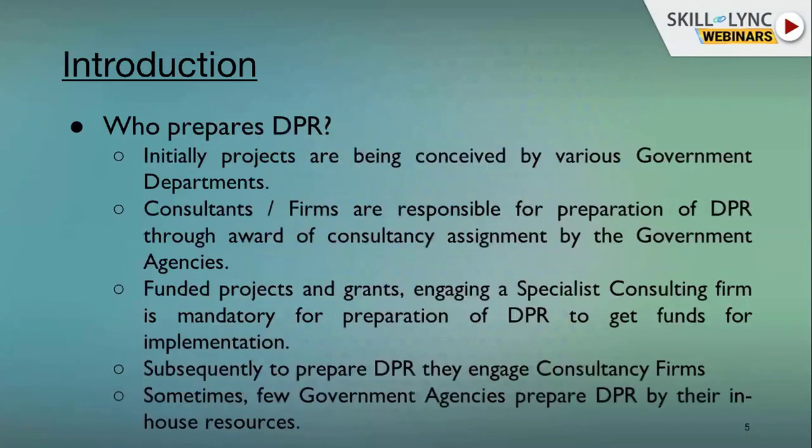So who goes for the DPR preparation? Initially, the project is considered by government departments. Then consultant firms are responsible for preparation of DPR by bidding, and this is awarded by the government agencies. There are funded projects by World Bank, ADB, JBIC, Japan banks, and these funded projects need specialist consultants for DPR preparation, which is mandatory for them. Subsequently, these DPRs are handled by consultancy firms. Some government agencies also prepare DPR with their in-house resources, but nowadays mainly consultants are preparing detailed project reports for the government.